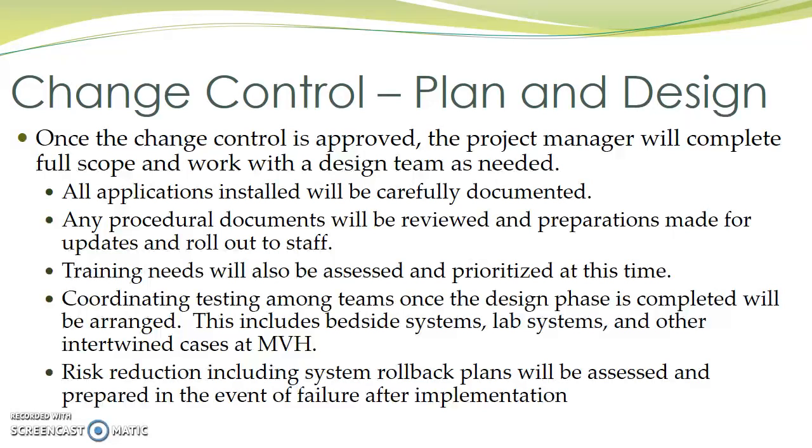Risk reduction, including system rollback plans, will be assessed and prepared in the event of failure after implementation. This way, if anything catastrophic happens during the implementation or any bugs are introduced, the system can immediately be backed out and restored to a previous state.